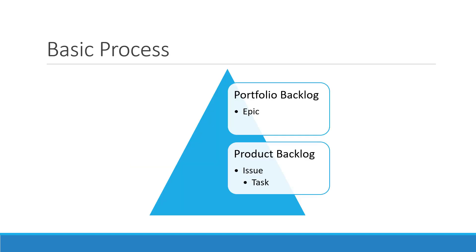The Basic process template has only a few work item types associated with a project. Whenever you create a project in Azure DevOps using the Basic process template, you will only find limited work item types: you can create an Epic, an Issue, and a Task. There are only limited work item types available in the Basic process.